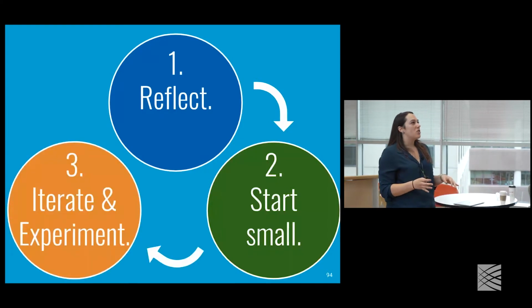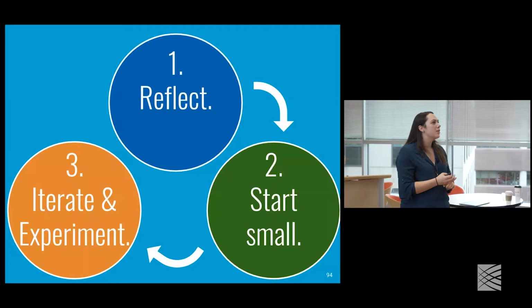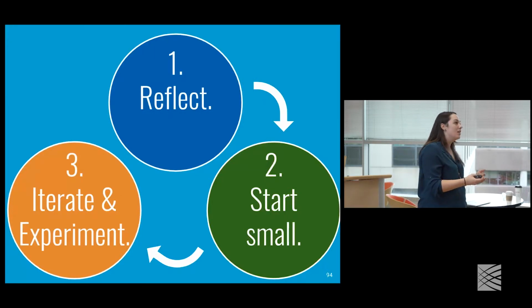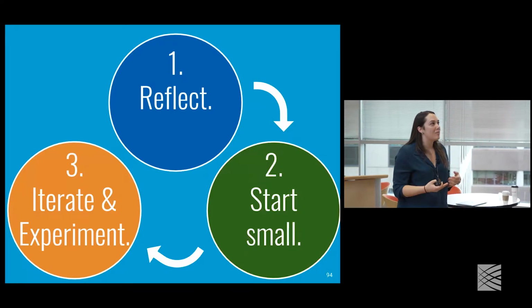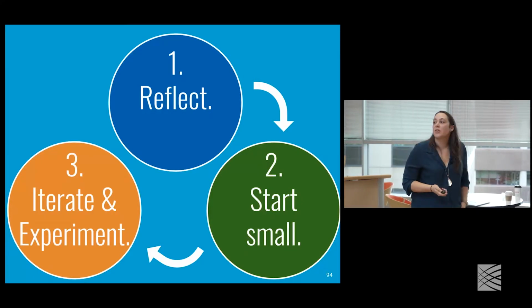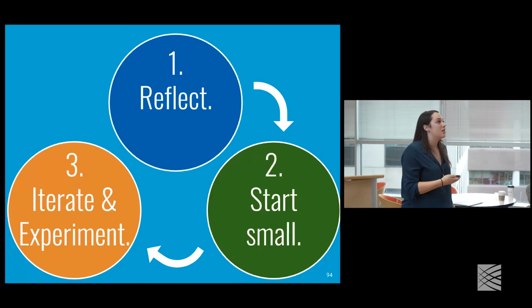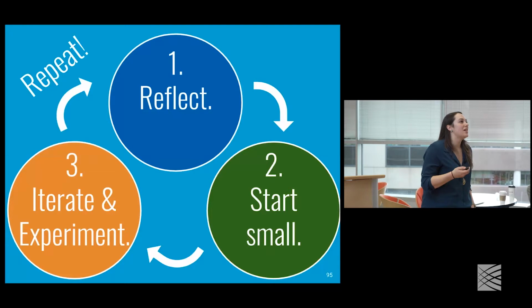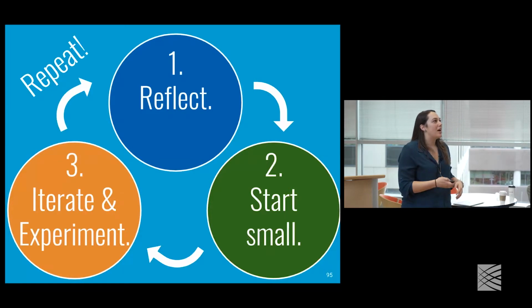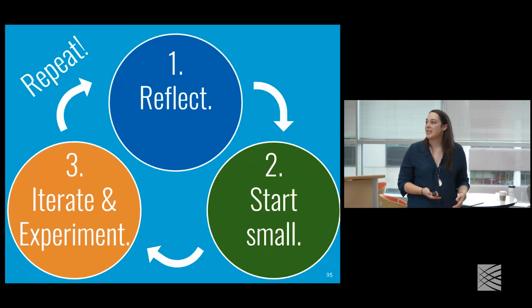Say you're interested in trying out a daily stand-up. Try one once a week. Do that for 2 or 3 weeks and then check in. Hey team, how is this going? How are you feeling about this cadence? And perhaps then you want to check in again, or you want to increase the frequency of that meeting, or not. But the important thing is that you're talking about it and that you're iterating on the things that you try. From there, just repeat the cycle and see where your decisions and your ideas take you.